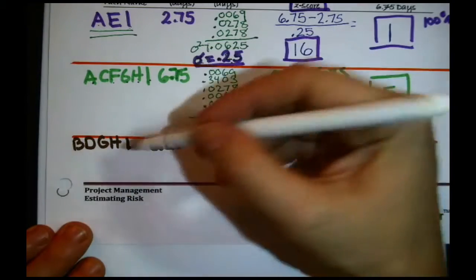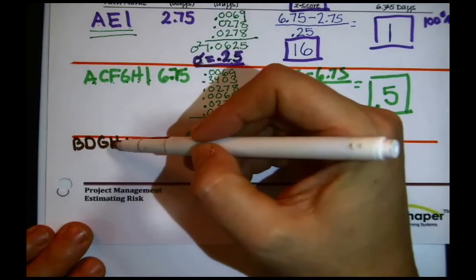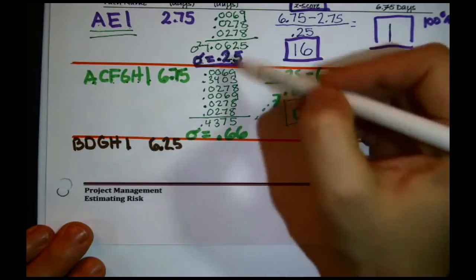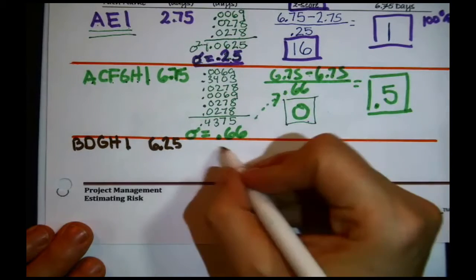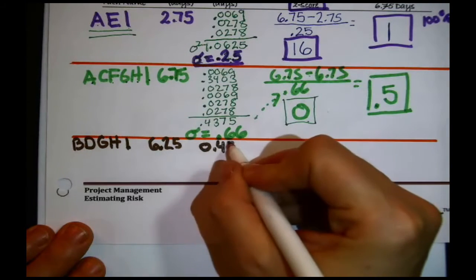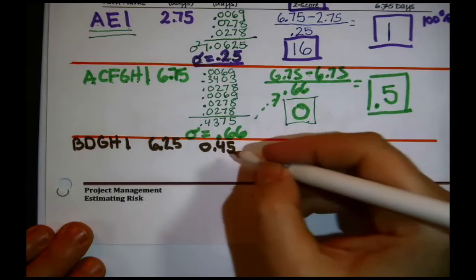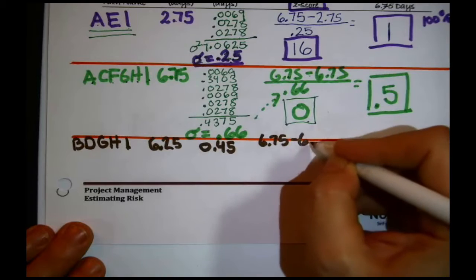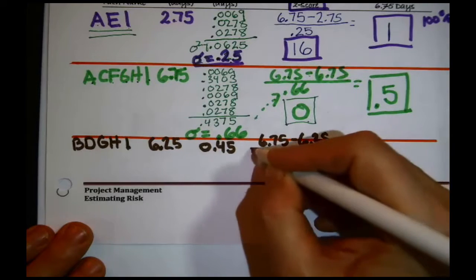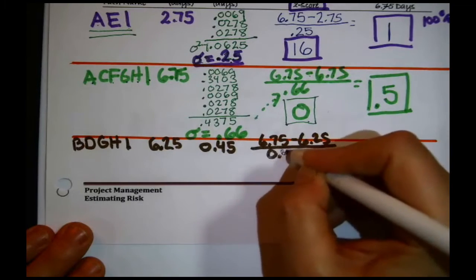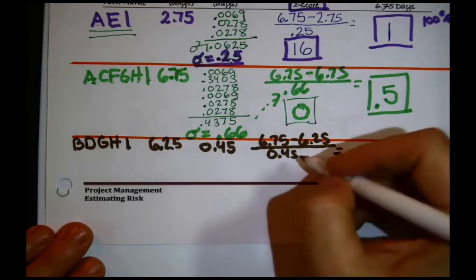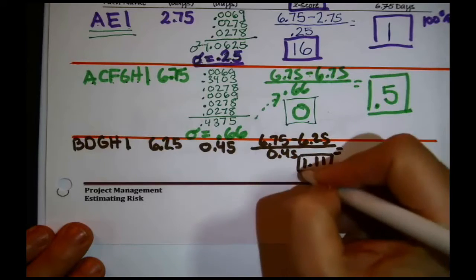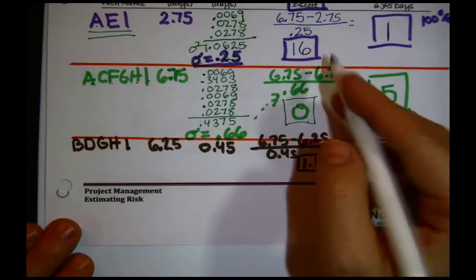If you add up each one of the variances, get the grand variance, take the square root of that, right? What we did here and what we did here, check me on this. You get 0.45. That's what you use in the z-score because you say 6.75 minus 6.25 is this path's mean divided by that 0.45 that I just quoted you. I get a z-score of 1.11, the z-score. Okay, 1.11.